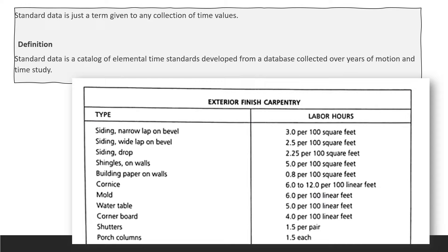I'll give you the top part of this table, the entire table is in your handout. Here you can see the exterior finished carpentry standard data telling you everything about labor hours. For siding narrow lap on bevel, you're going to spend 3.0 hours per 100 square feet. That's your standard data.